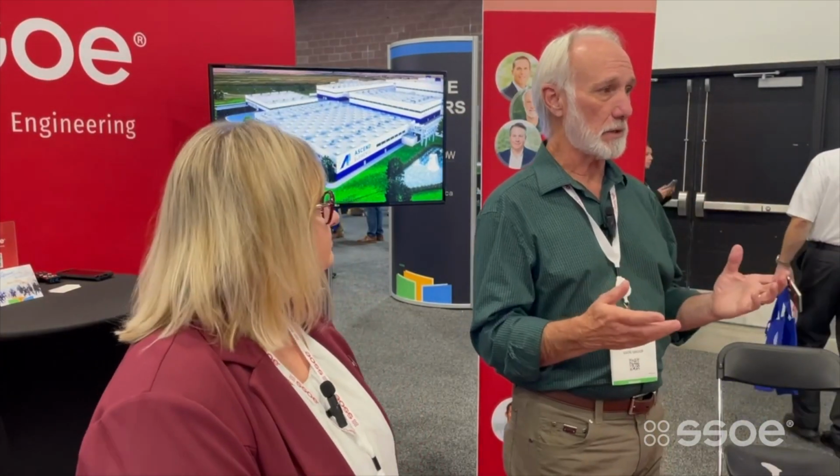But what we've been learning is like this vertical transport. Who would think? But it becomes important. And the thing is you have to tell your clients, well, you need a freight elevator, and then there are different ratings for the freight elevator. How much do you put on at one time? That's what they're having troubles with. One of our other clients, they were using passenger elevators, and they're just not designed for the load or the duty cycle. And so it's odd what becomes kind of the sticky factor.